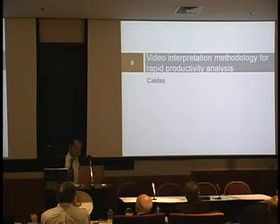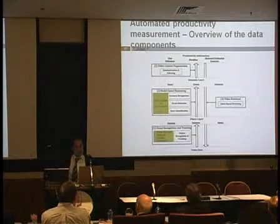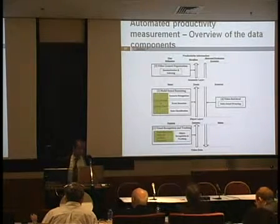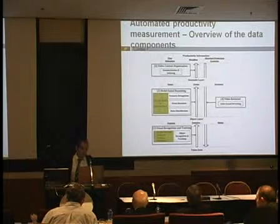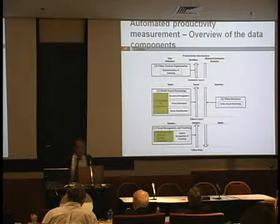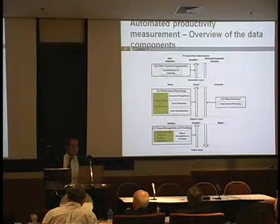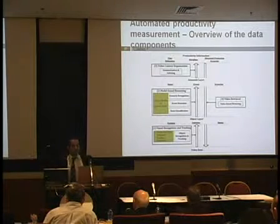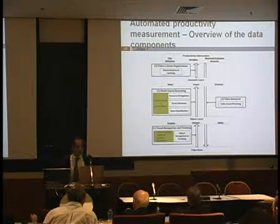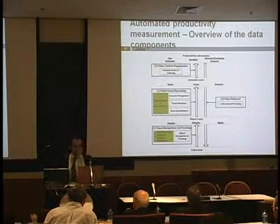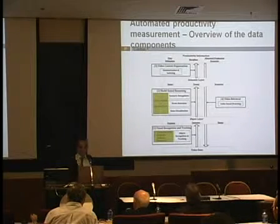Another researcher proposed and implemented a video interpretation methodology for rapid productivity analysis. The model has four layers. In the lower level, we have the video data, which is transferred to the object layer — position, trajectory, and motion. That is then transferred to the semantic level using model-based reasoning, where states, events, and scenarios are extracted. These are then transferred to productivity information: time utilization, workflow, and abnormal production scenarios.